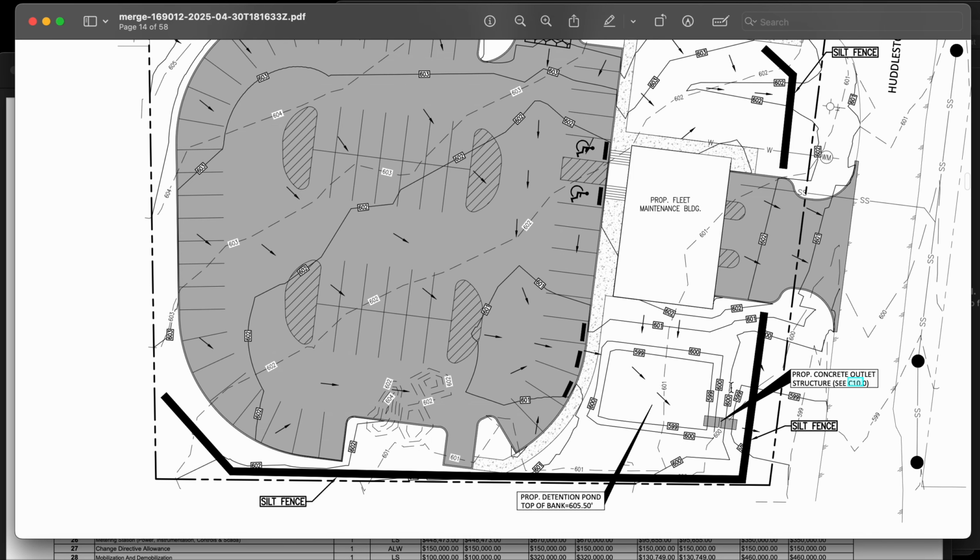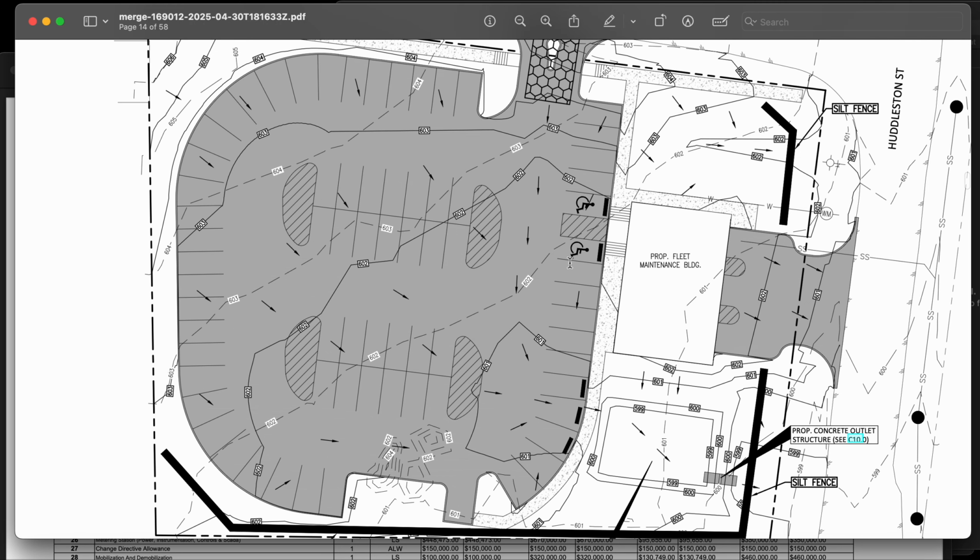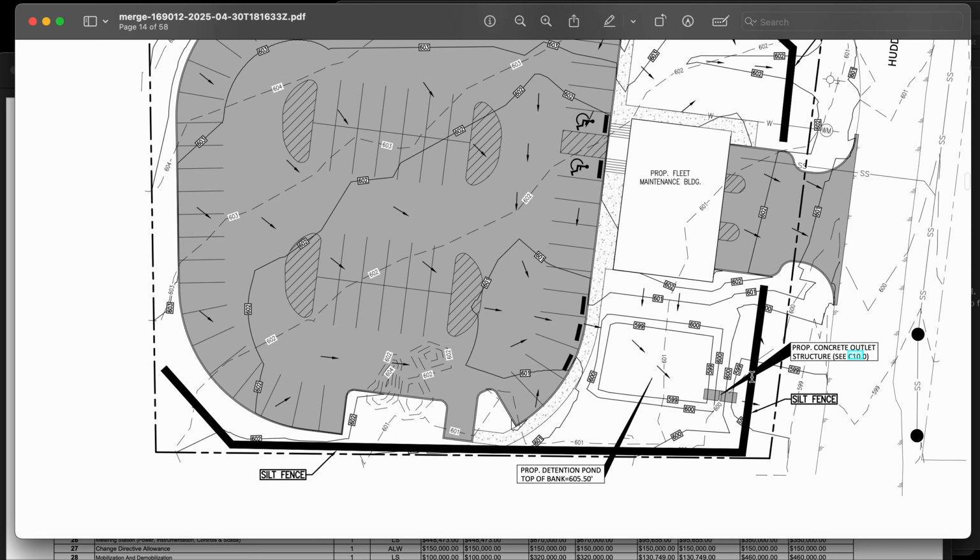Okay, silt fence, we have a guy that does it for $2.50-ish. We add another $1.50 to bring the skid steer in. For example, if it was full of trees, full of vegetation, we'll bring the skid steer in there and clean it up, and that way it's nice and neat on the line.